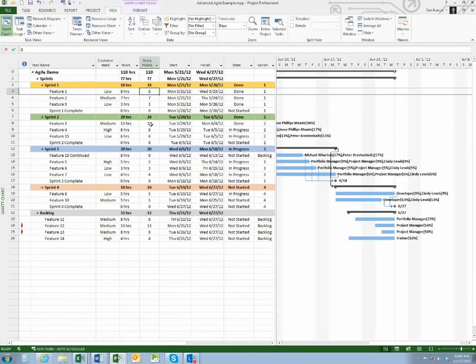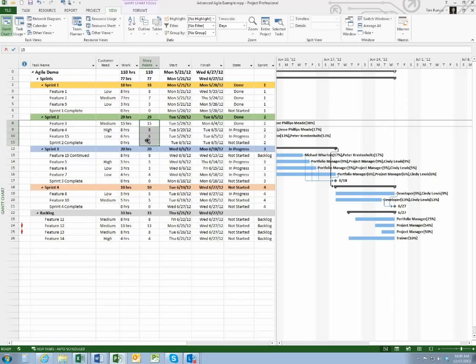But overall, the idea is that a story point helps you to define the complexity. We have customers that we work with, especially in retail manufacturing, that actually go with shirt sizes. So they go, hey, this is a small, it's a medium, it's a large, it's an extra large. And so they'll quantify something where they can begin to look at how many points or what is the size. And as they begin planning and successfully rolling out one sprint to another, they can figure out how many story points they can actually accomplish, which might translate to hours or the number of resources, whether they're dedicated or non-dedicated,